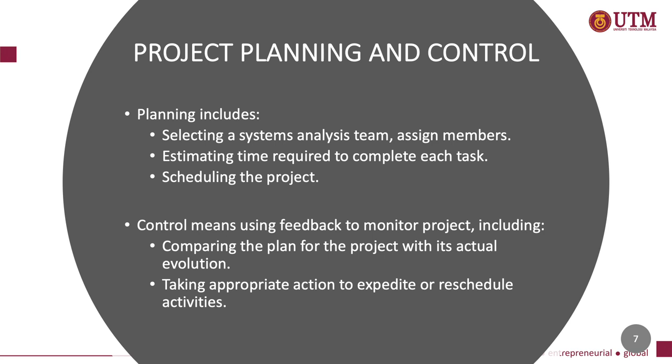As the project begins, it is crucial to control and monitor the project progress. The progress of a project can be tracked, controlled, and monitored by comparing the prior planning with the current and actual ongoing activities with their percentage of achievement.